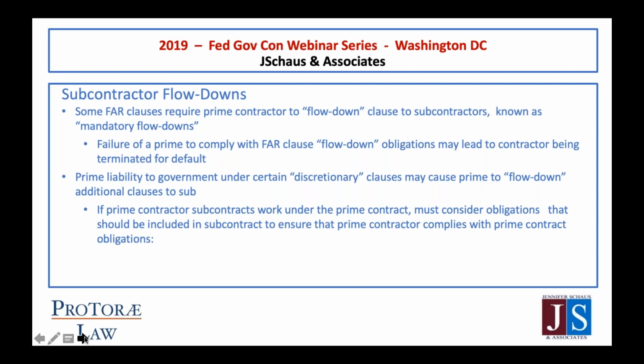And that generally depends on whether or not that vendor, entity, person is actually performing a part of the scope of work. I mean, if there is some third party that has a relationship with the prime that is performing part of the statement of work, that entity or person is a subcontractor. And in that regard, the prime must include those subcontract provisions in the subcontract.